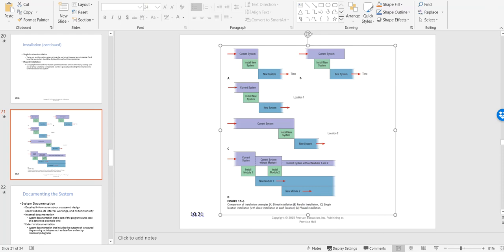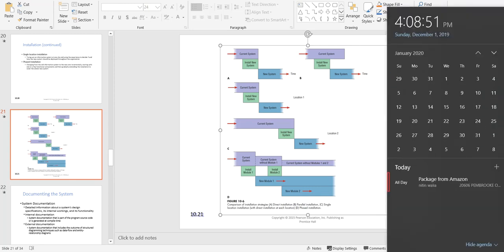The downside of it could be that you're duplicating your efforts for the whole 1 month. So for the whole month, maybe you're entering the data twice, or you are going through two processes or two forms for the same thing. You're duplicating your work, which can create some confusion, and it could be that most of the users of the new system might not even touch it for the first 15-20 days, because they know, oh, we have the old system still for 30 days.